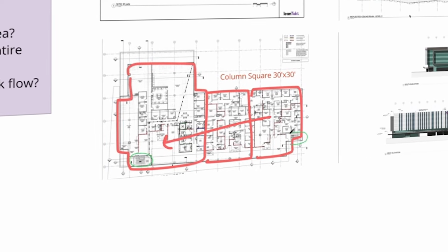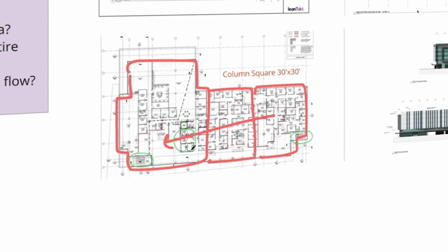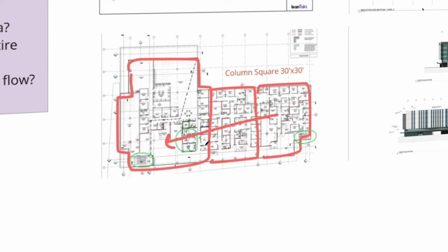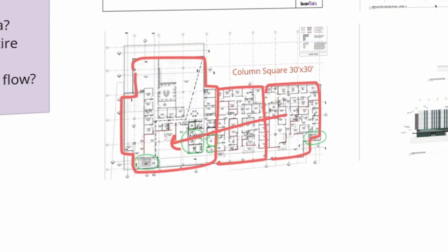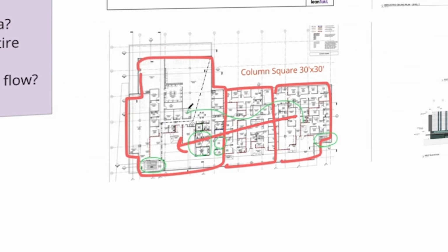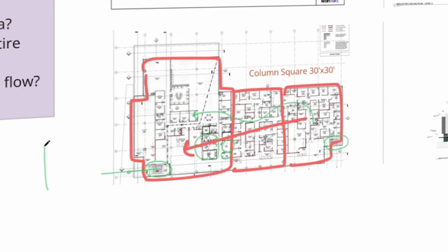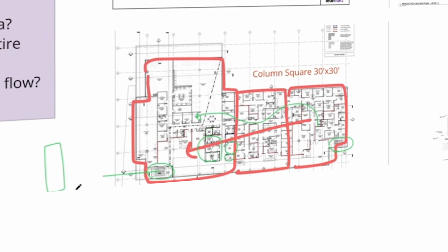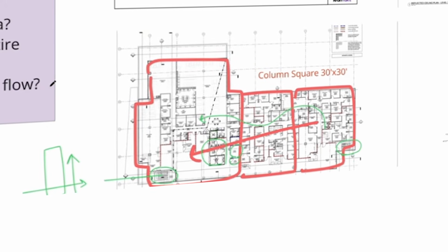Oh, this stair is probably a vertical flow. Oh my gosh, probably the elevators and bathrooms are the same way. Then somebody else chimes in, "Hey, the electrical room and the comm rooms, let's do those as vertical flows, right?" So horizontal flow is flowing through the building horizontally. Vertical flow means that this stair, if you break it up into the different levels, is flowing vertically, not horizontally. And then workable backlog, we'll talk about that later.